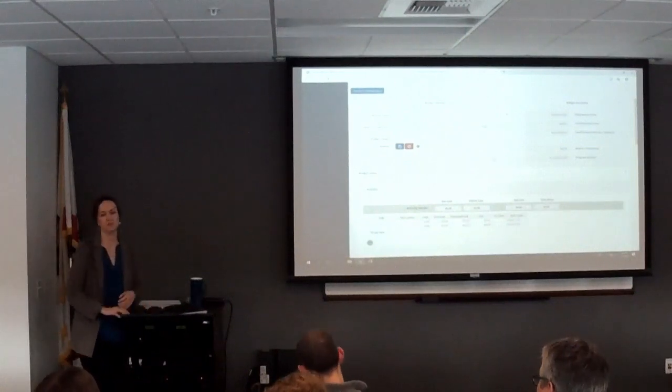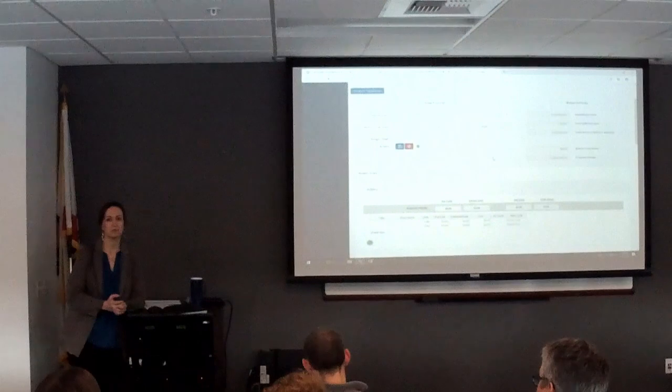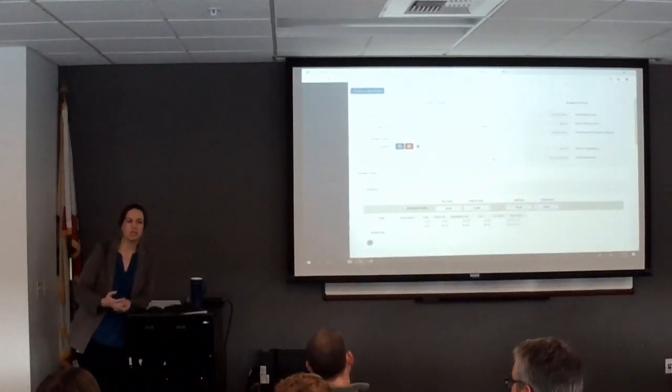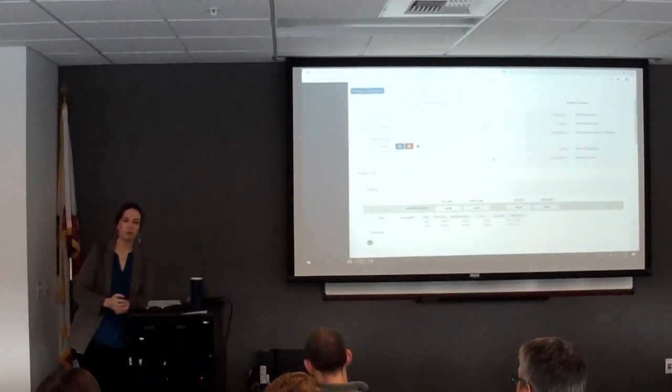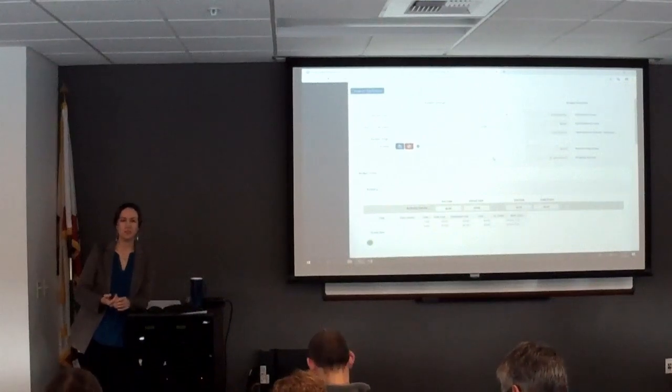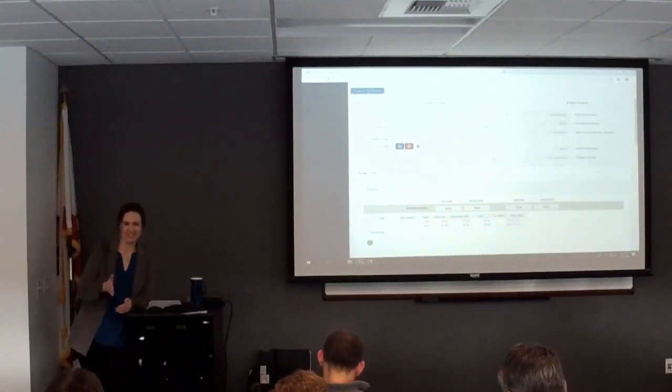But your pre-agreement costs, are they pretty much general admin in nature, like your NEPA? I can't think of anything else. Well, it could also be some engineering and design. Okay. You know, we had talked about doing pre-development, that is still an option. We really don't want to do that because it's high risk, so we'd rather you just do pre-agreement costs and come in with a ready-to-go project. But you're not doing a project that would be a choice limiting action, you know? Correct. So, I'm just maybe speaking out loud here. Yes, take yourself up to the choice limiting action barrier and anything before that. Okay, thank you.